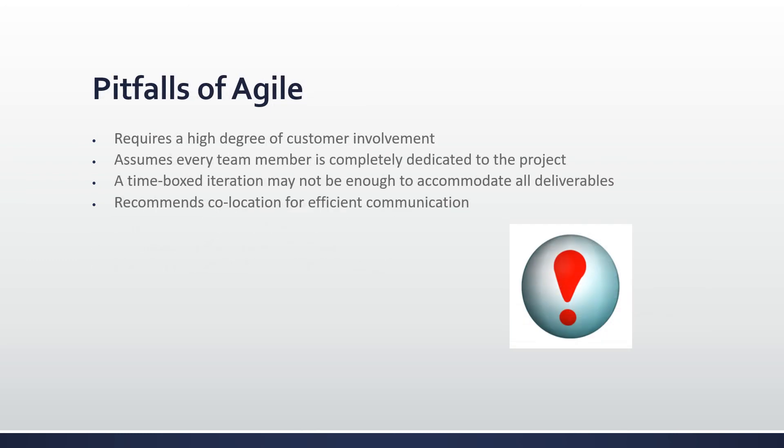Agile does have some pitfalls. Agile requires a high degree of customer involvement, which not all customers are comfortable with or prefer to give. Agile assumes that every team member is completely dedicated to the project, without which the principle of self-management is weakened. Time-boxed iterations may not be enough to accommodate all deliverables, requiring changes in priority and additional sprints that could drive up cost. Agile also recommends co-location for efficient communication, which is not always possible.